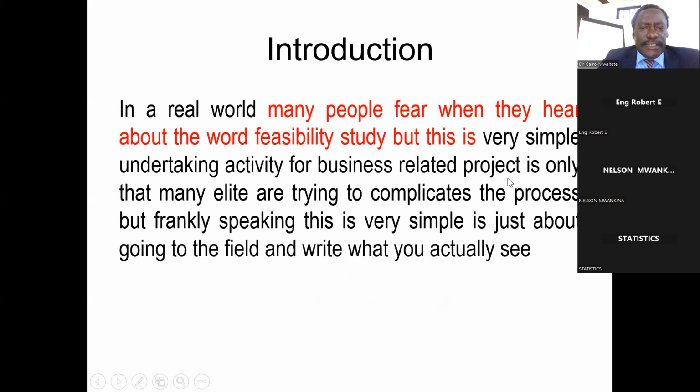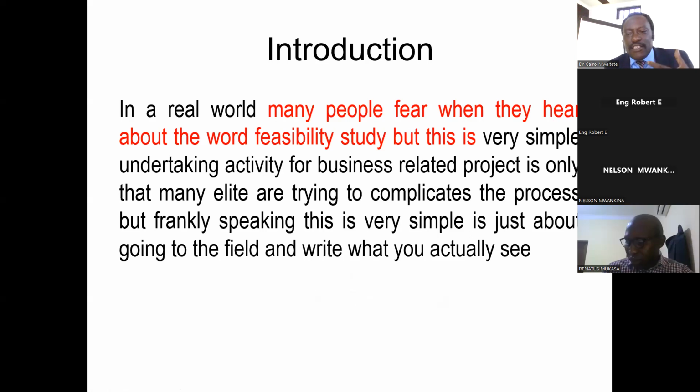Why? It's related to a business-related activity, and the only thing is that many people are trying to complicate the issue of feasibility, as if it is something very difficult to be undertaken, but this is simple. You only need to go out in the field, identify the actual costs, determine the revenue, and establish profitability, and also examine whether there are returns or no returns.